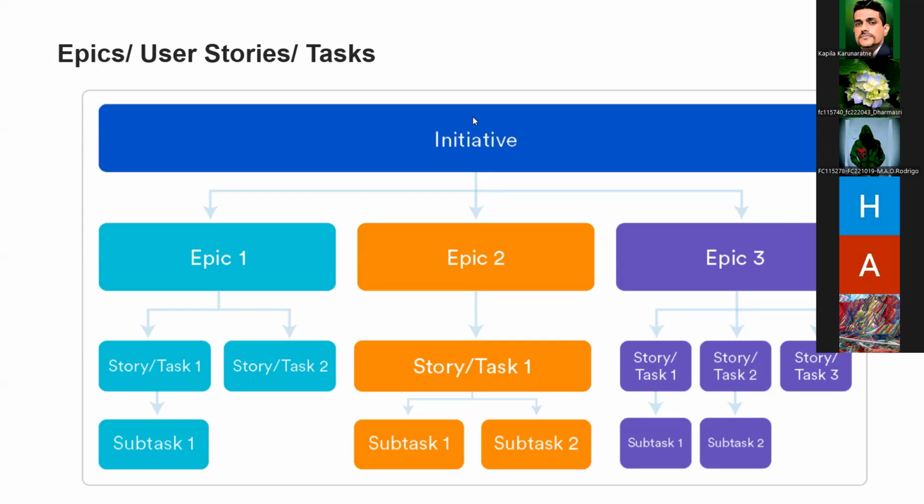Right. So this is a bit about how we are going to manage the backlog. Basically, you will get a project, or you will have an application requirement coming in to develop. This requirement will be developed as epics. Basically, it will be divided into a few epics. So if you want to implement an internet banking application, there will be a set of epics. Maybe fund transfer will be one epic. Bill payment will be another one. User registration will be another epic. Likewise, those will be epics. So under the epic, there will be multiple stories.